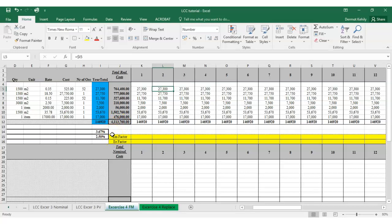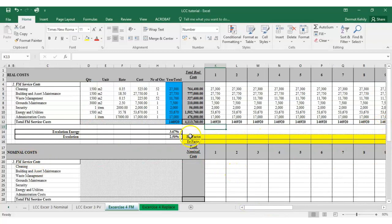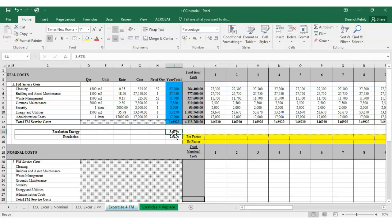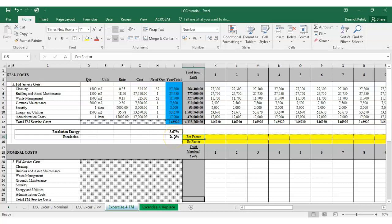Give these a comma separator to show they're numbers. We've got a significant sum over 28 years in terms of facilities management costs — €4,113,760. Continuing from that, we need to calculate our nominal costs, our future forecast costs accounting for escalation. There are a couple of different escalation rates: one for normal escalation covering construction materials and services, and a separate, higher rate for energy escalation, since energy prices have been increasing at a greater rate than normal goods and services.